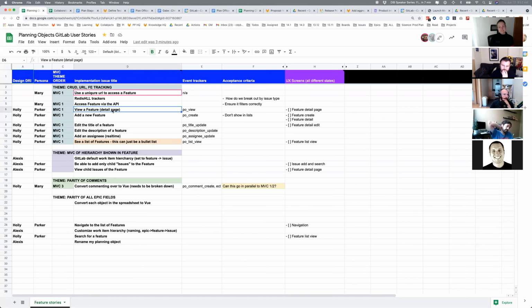We can start off with weighing what it would take to build this stuff out in a greenfield page without a design attached to it, just essentially using widgets for a lot of these components. But then we'll probably need to reweight it once we do get the design, depending on how different it is from our current issue page.